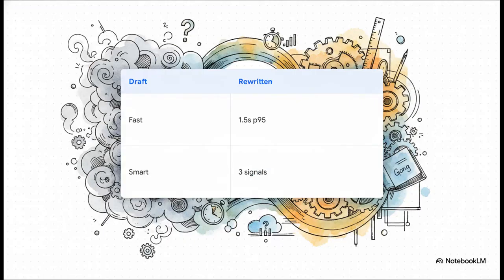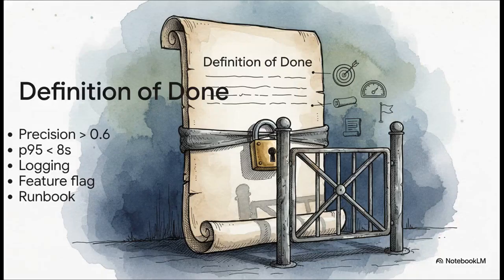This next part is brilliant because it illustrates how Priya turns truly awful draft acceptance criteria into solid gold. Look, FDEs often write things like, the system should be fast, or the AI should be smart. Guys, those are banned, ambiguous words. Priya rewrites them into concrete requirements with strict targets, a rendering time of 1.5 seconds at the 95th percentile, and specific Gong-derived signals like stakeholder changes or sentiment shifts. There's no more guessing.